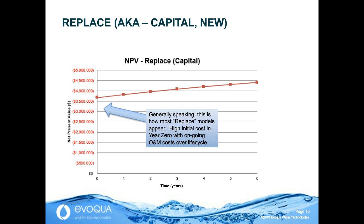The capital expenditures. And so for water equipment, for a water treatment system, we might have to include factors like installation, right? Do we need a building? Do we have any civil work that needs to be done? Soil examination, engineering, drawings. What kind of drawings do we want with our system? That's going to affect our price point, our cost point. What kind of tie-ins do we have to the existing system? Not just from a cost standpoint, functionally making those mechanical and those electrical connections, but also from a drawing standpoint.